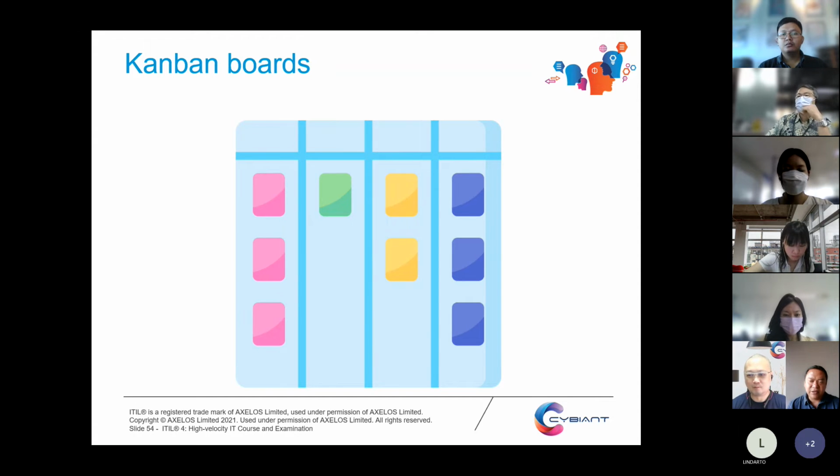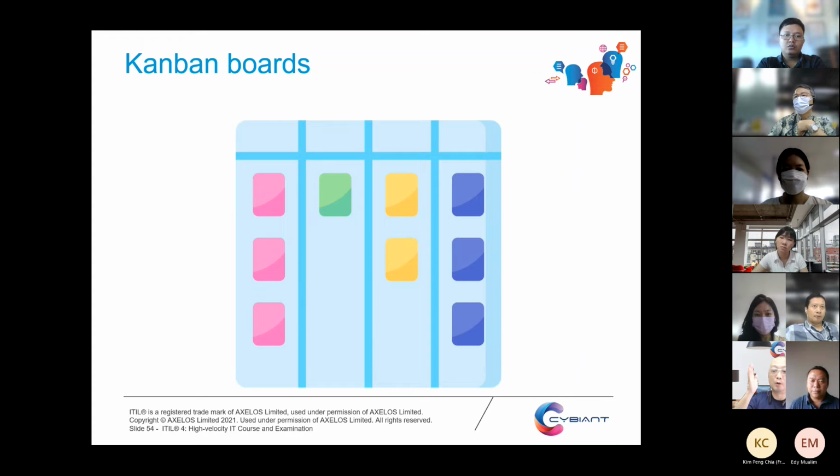It's a list of the activities. Alright, come again. It's a list of the activities that we're going to do with the team. Very good. So that will be on the first column, right? The left-hand side. To-do list, the task list. Yeah. So in Agile or Scrum, they call it backlog. So what's the second column? Anybody remember? Progress. To do. Work in progress. They've committed. They actually pull from the to-do first column to the second column, which is work in progress.